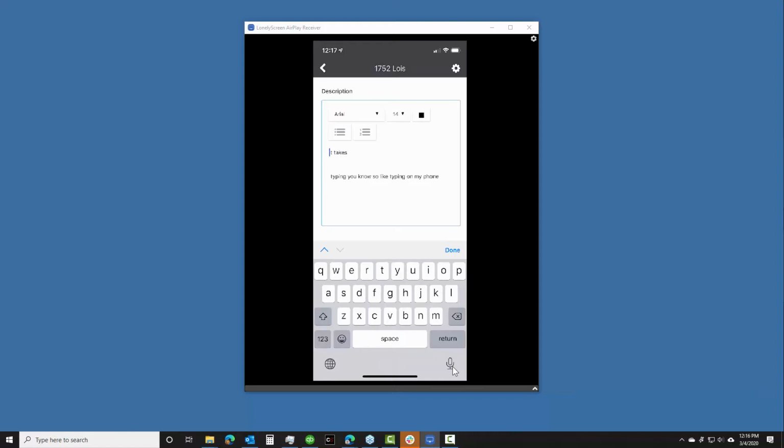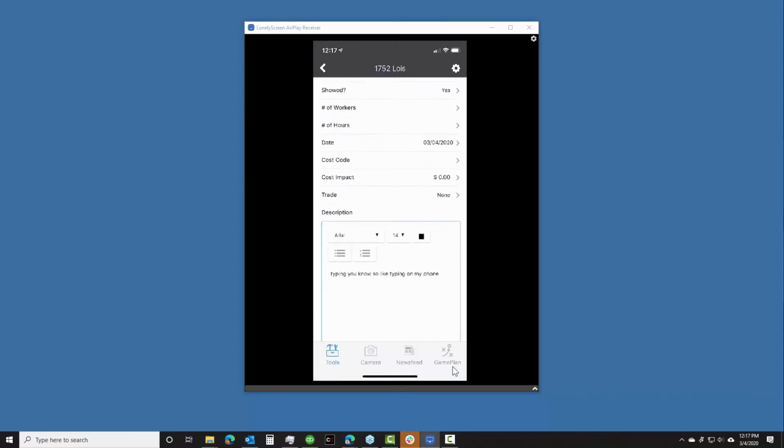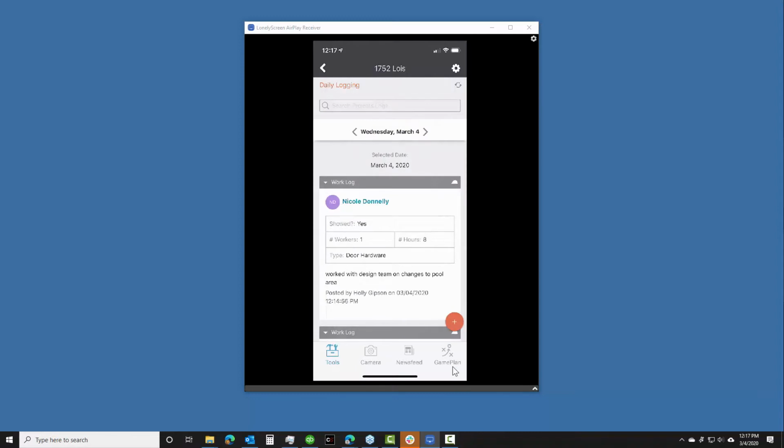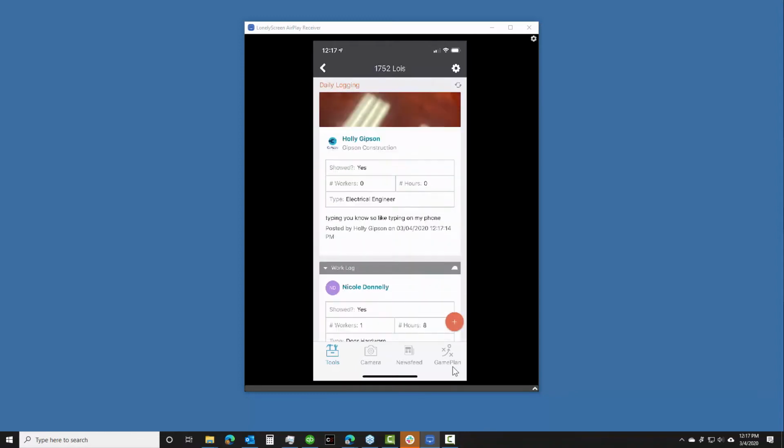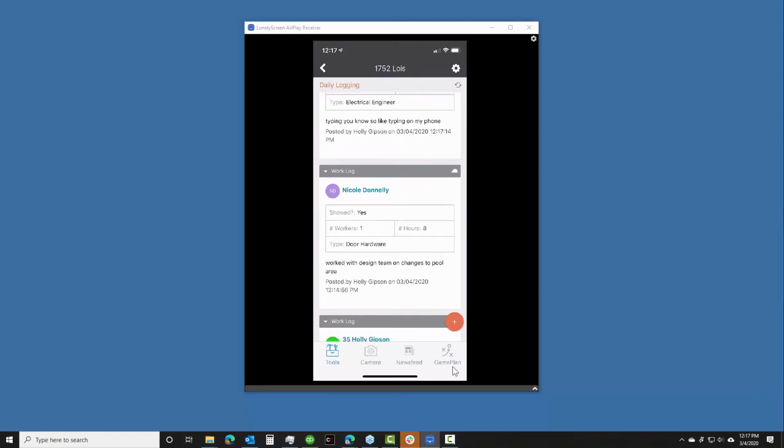I was talking with one of our clients who's also a construction business consultant, and he was telling us that with one company he was working with, it took about 2 or 3 weeks to get people into the habit of posting logs daily. That's kind of in the name. The ideal situation would be that you're getting at least one update per day.